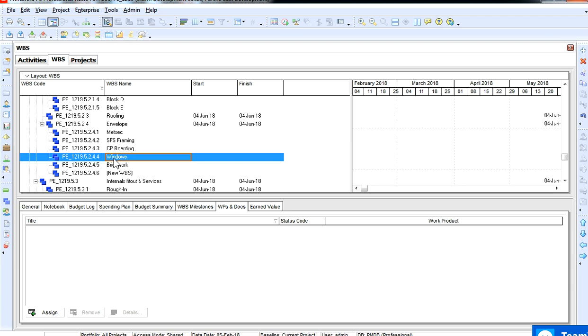So the windows come on first, and then you build the brick around the frame of the window, so there won't be any spaces for moisture to get through. Remember, when you do the exterior of any building, you're supposed to make it watertight. That's why the brickwork comes straight after the windows.